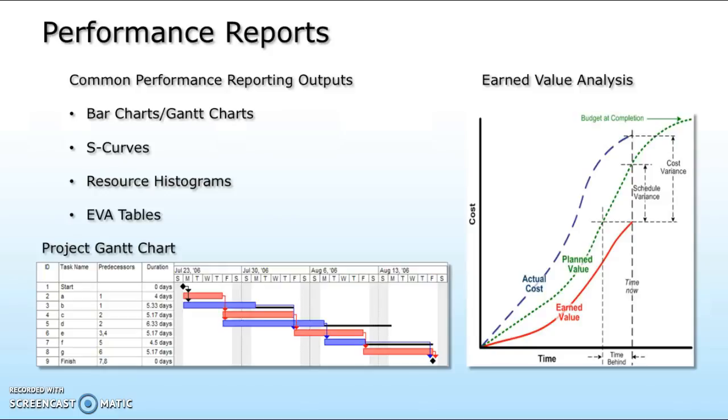Performance reporting should generally provide information on scope, schedule, cost, and quality. Many projects also require information on risk and procurement, with reports being prepared comprehensively or on an exceptions basis. Performance reporting includes performance review meetings held to assess project status and progress in conjunction with one or more performance reporting techniques.